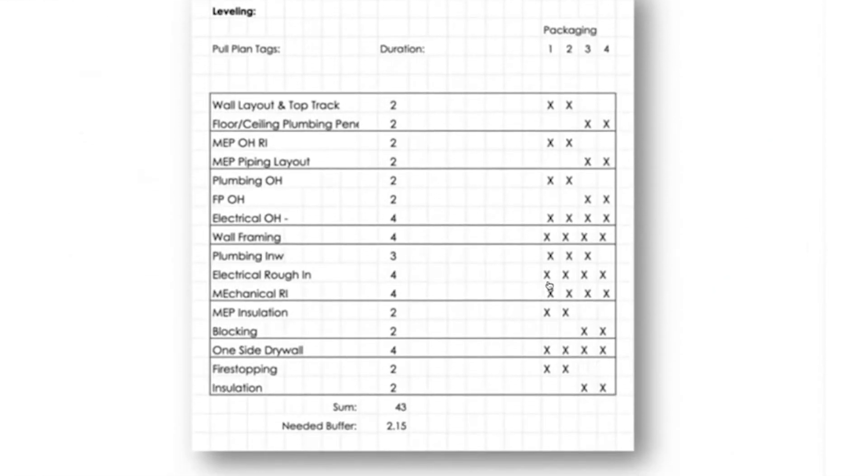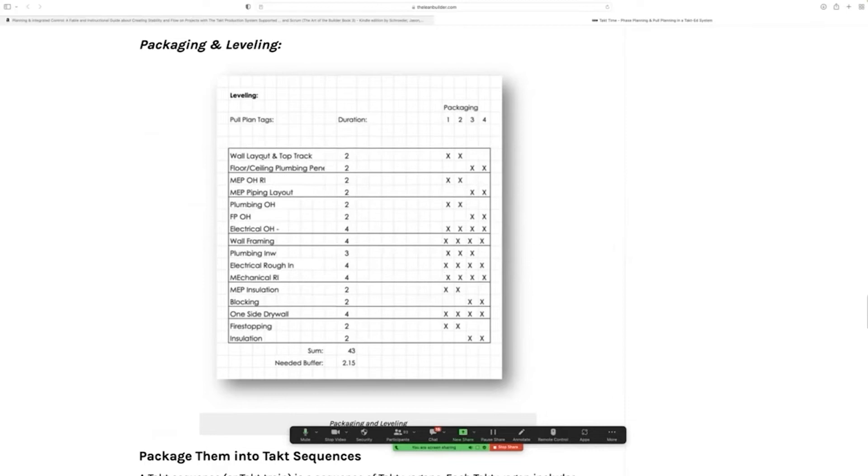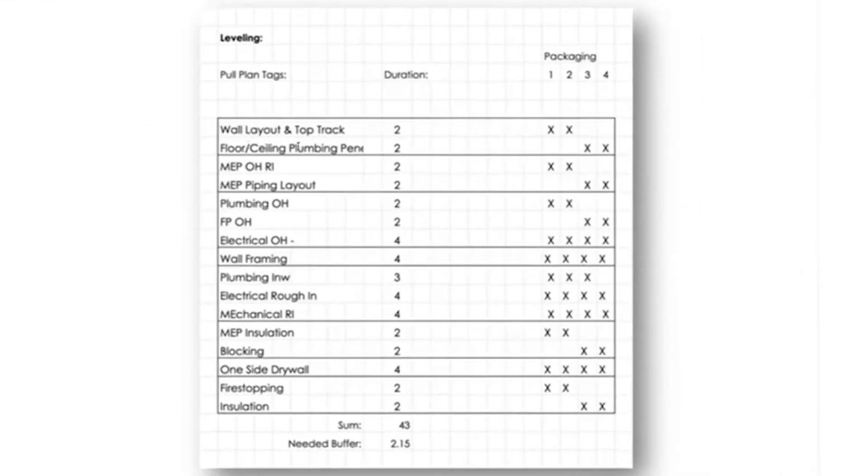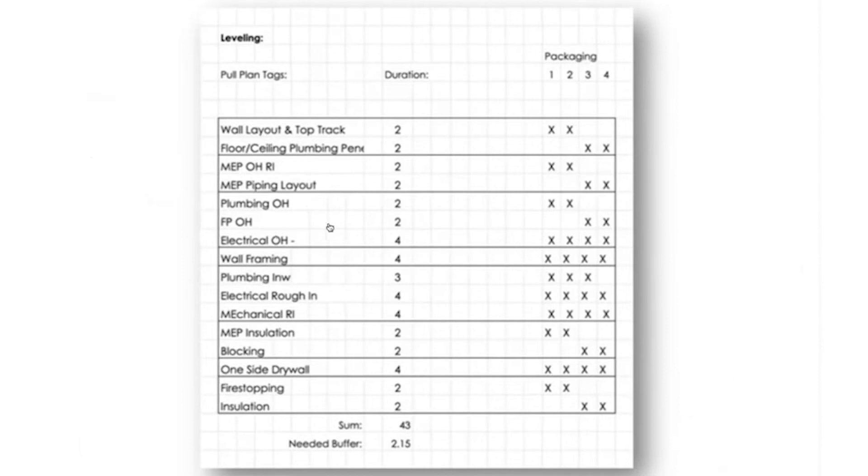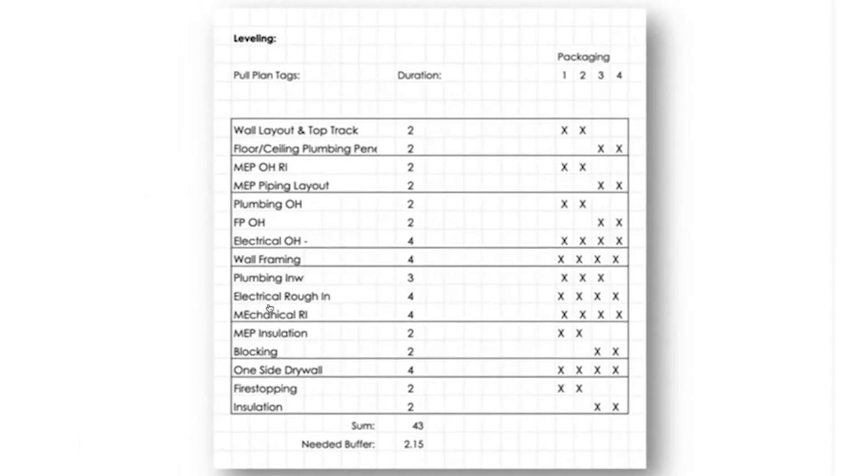And this is the most important part of tact planning. Meaning you package those activities into tact wagons. So you'll see there are two work packages inside this first tact wagon. There's two in the second one. There's three in the third one. There's one in the fourth one. You get my point.